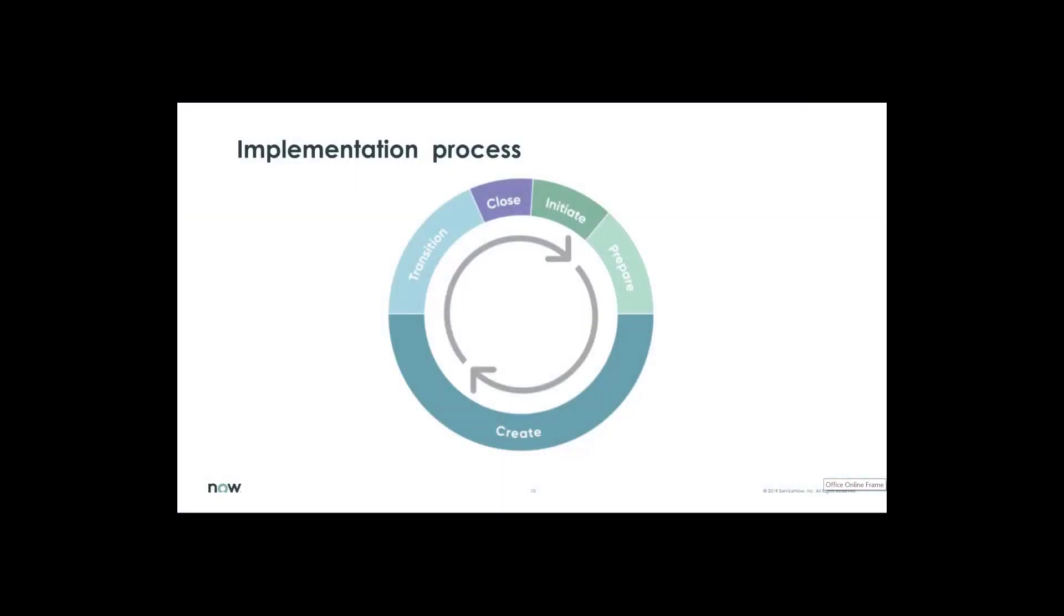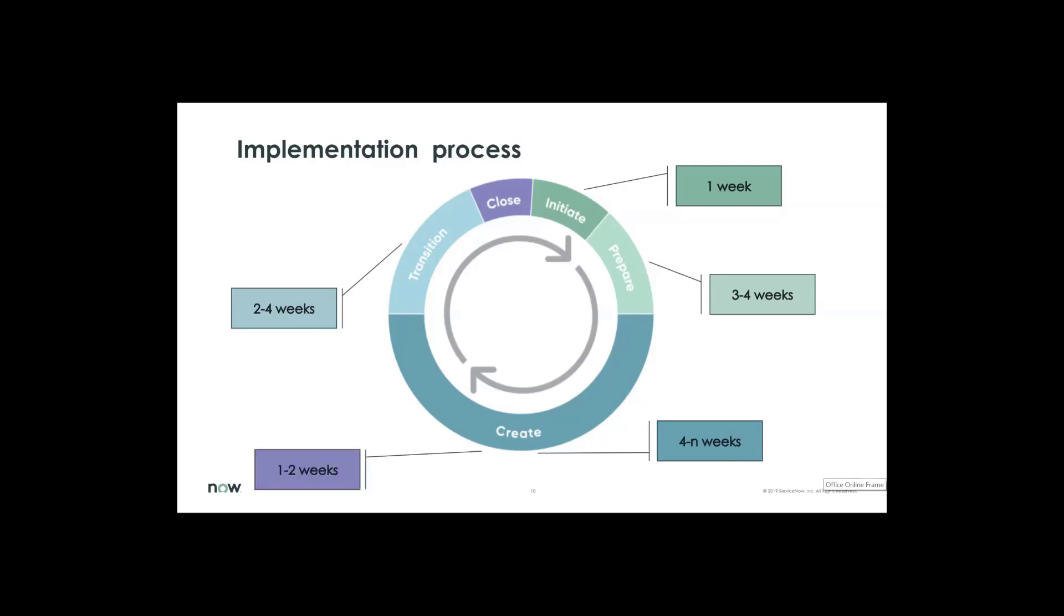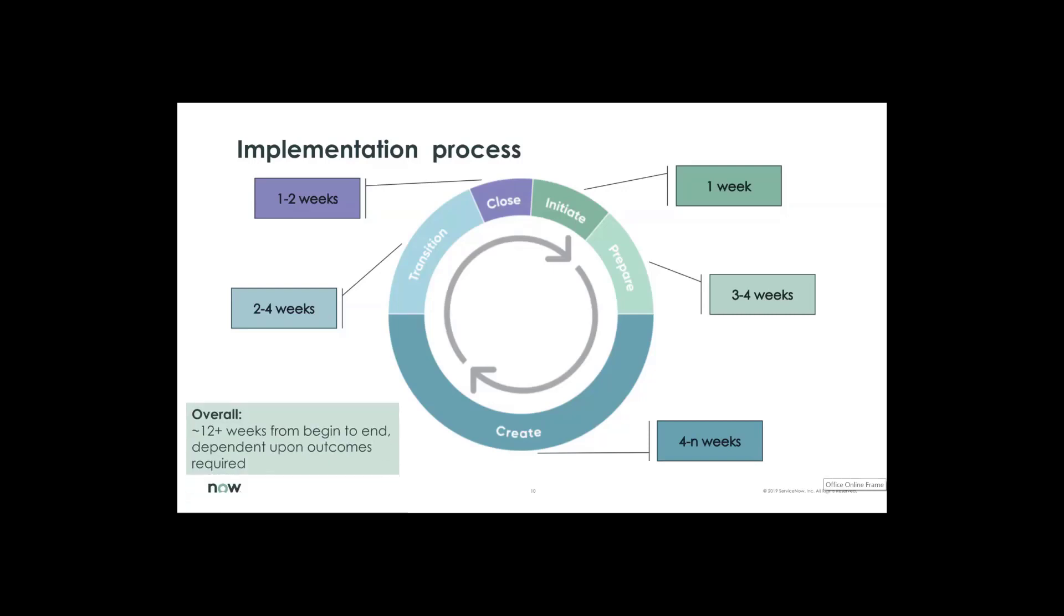Thanks Eric. In our implementation process, we're going to start out in these phases. We initiate, we estimate, traditionally most use cases one week. And then we move on to the prepare stage, which could take up to three to four weeks, depending on your use cases. And once we align on what our use cases are and we're prepared to initiate in the create phase, we're going to execute on what we signed off on. And that could be four to X number of weeks, depending on how many use cases we're implementing. And then we'll have a sign off and a transition where we hand over the keys to the system and you start running with it. And that's like a two to four week process. And then a close out where we sign off on deliverables, one to two weeks. So overall, 12 weeks from beginning to end.